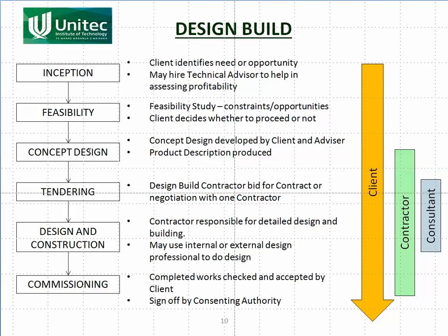So the client may hire another consultant, and that consultant and the client sort of develop an idea of, this is what I want. I want a 4-lane highway, I want it to be this wide, I want it to have cycle lanes, whatever you want. So you're giving them enough information that the contractors, the design build contractors, can actually have a good idea of what they're supposed to design and build.